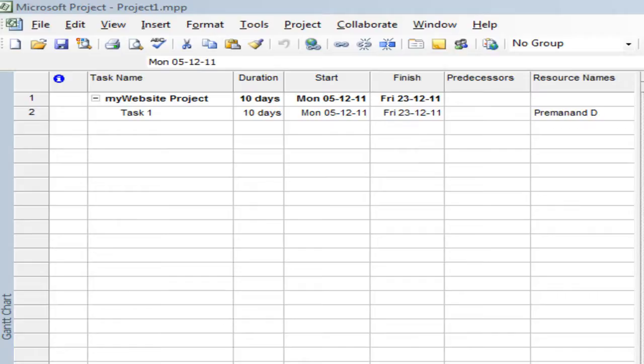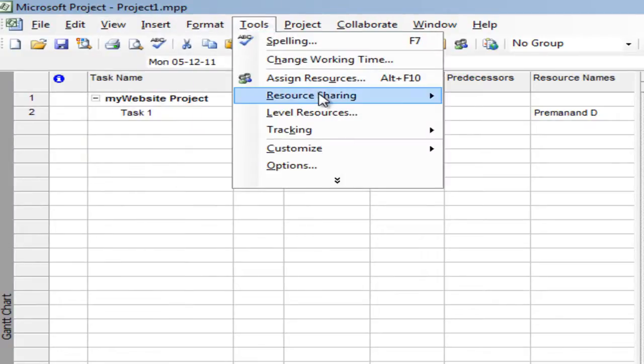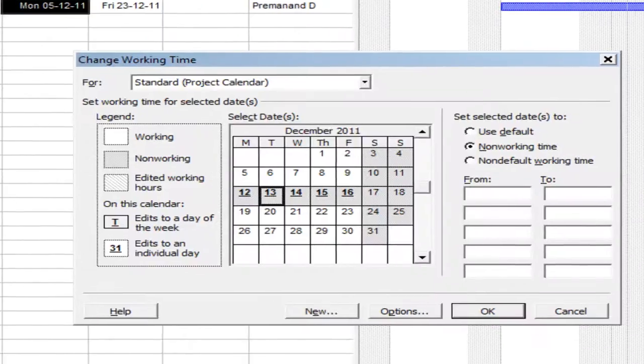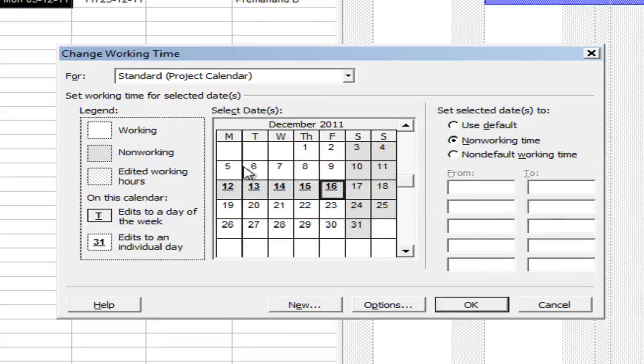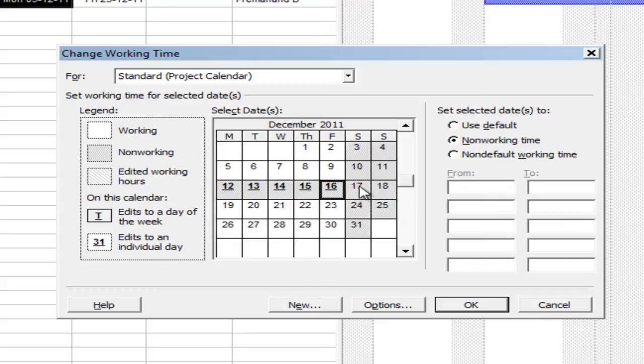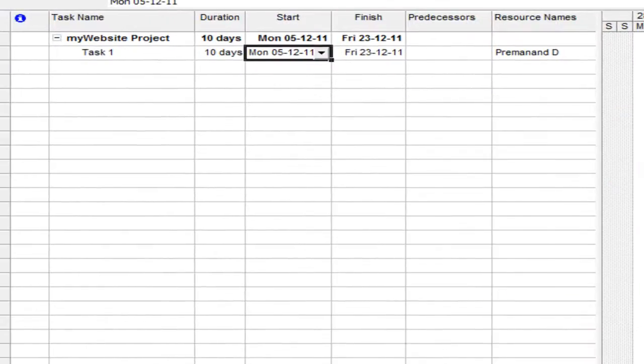Just to recap on the last session, in session 4 I spoke about how to set up the project holidays or the public holidays. It's not for a very specific resource or team member, but in a country, for example, Christmas holidays. I showed you that in the tools change working time, we have set up the particular days we wanted to choose as the public holidays, set them as non-working time, and automatically the tool takes care of scheduling it appropriately.